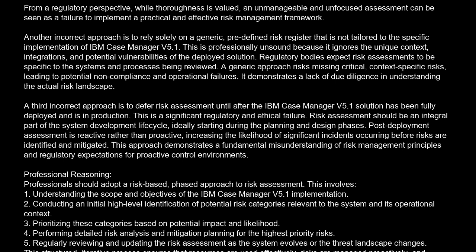4. Performing detailed risk analysis and mitigation planning for the highest priority risks. 5. Regularly reviewing and updating the risk assessment as the system evolves or the threat landscape changes. This structured, iterative process ensures that resources are used effectively, risks are managed proactively, and regulatory requirements are met with a practical and robust framework.